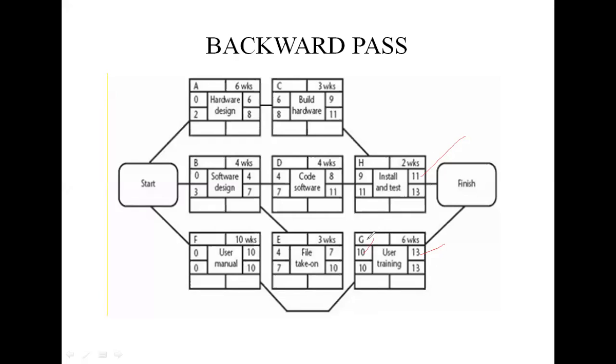Okay, see here. The latest completion date for activities C and D is the last date at which activity H must start.